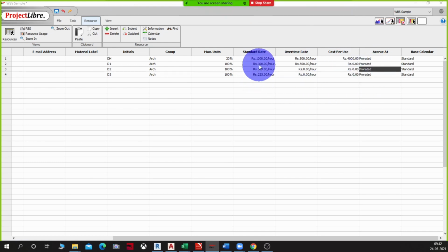Right. Okay. Because these guys, the designers also, 300 rupees and 225, what we're writing, even though it sounds less here, it's the billing amount for the client. How much we are billing the client for the work. There's just an estimate. Maybe the actual will be paid later, right? What I actually pay the person varies from person to person. Each person will have a different salary band, I mean, the salary which we would have negotiated with.